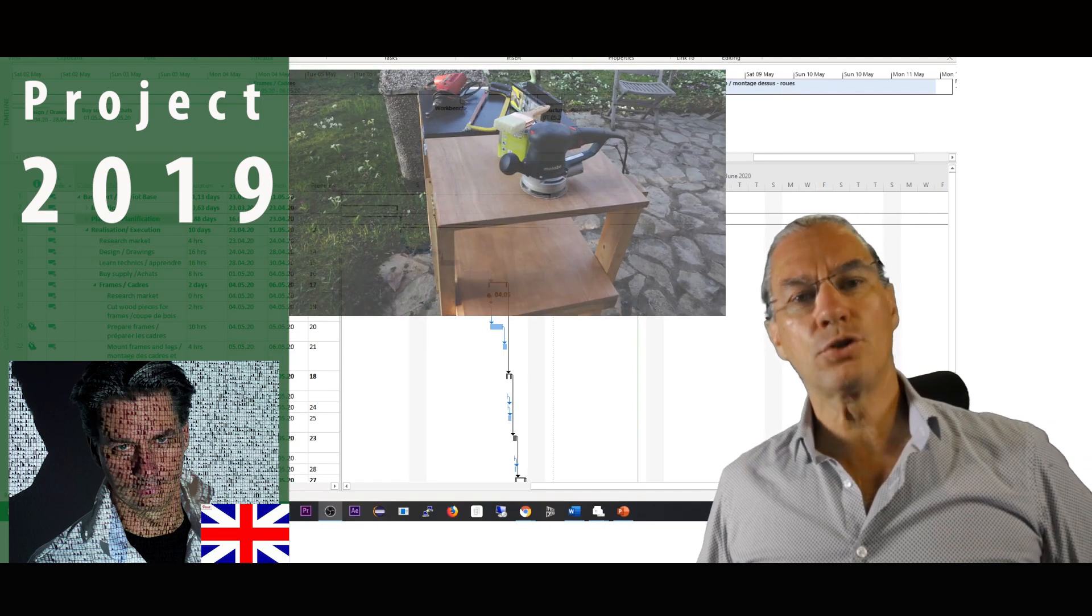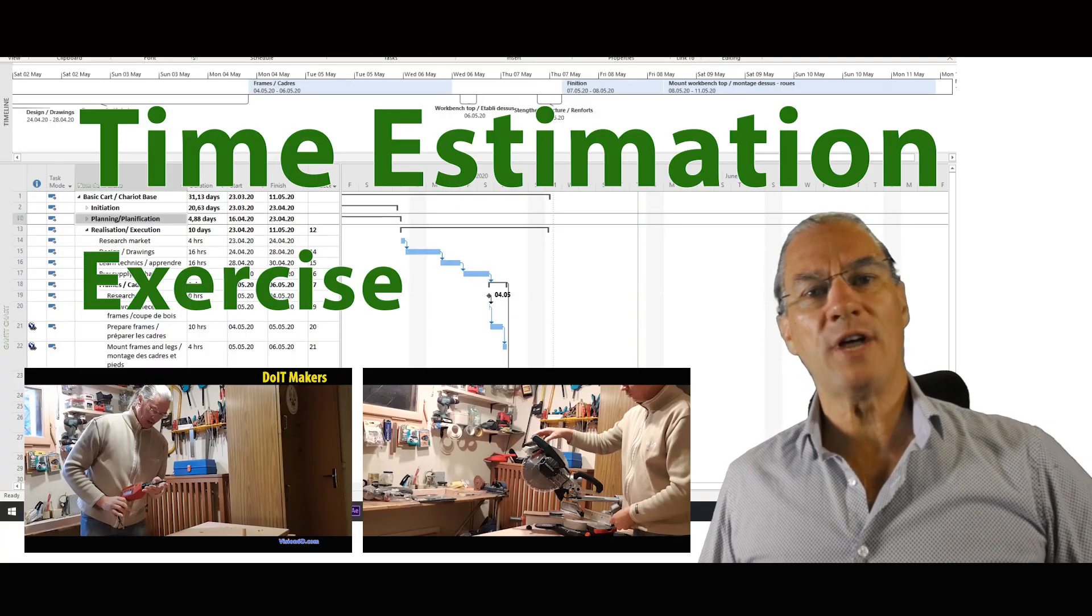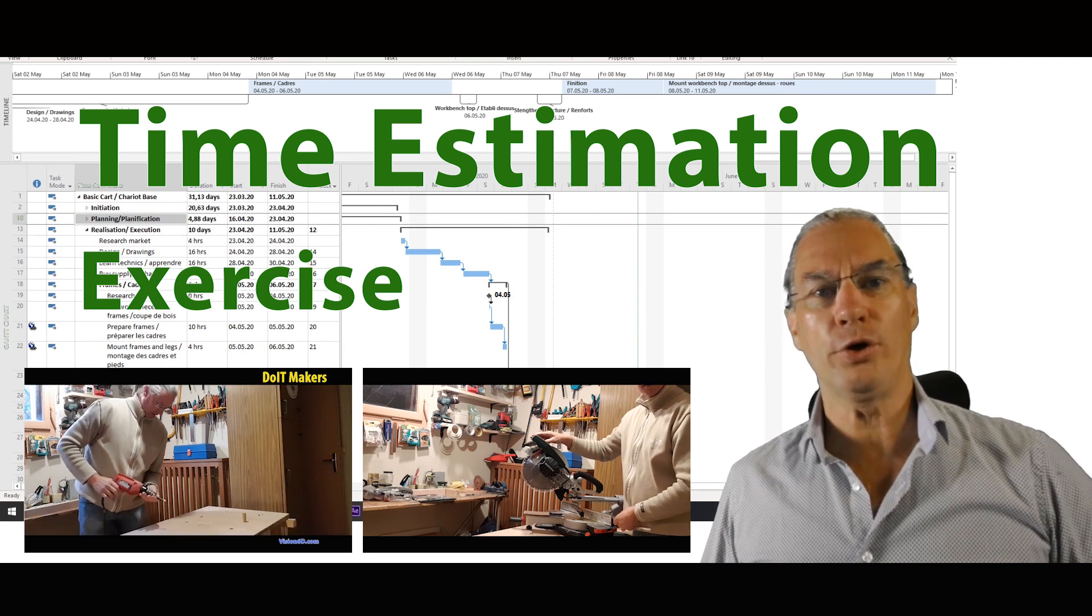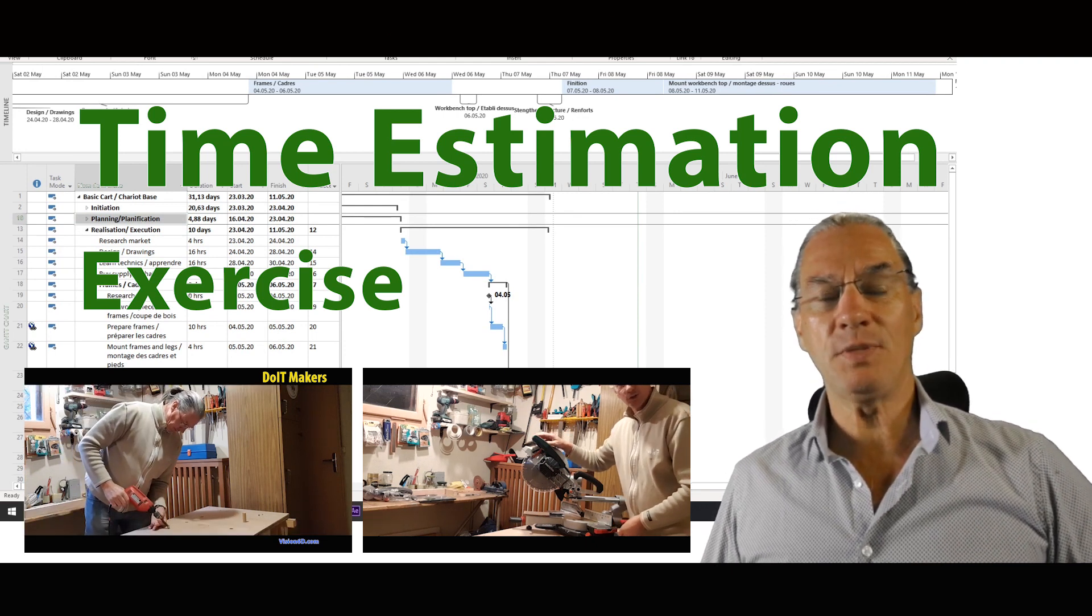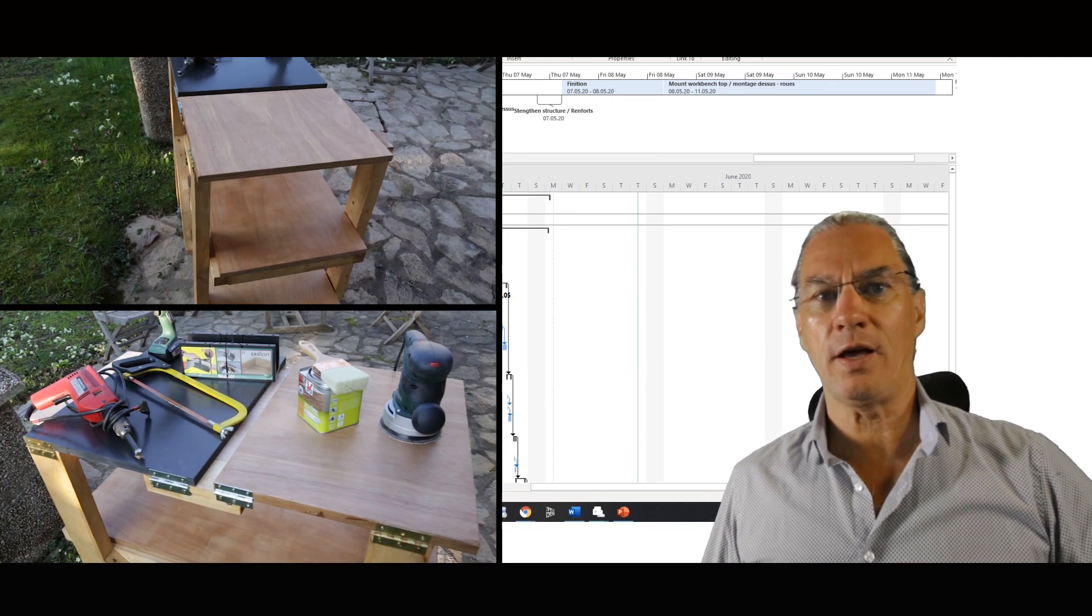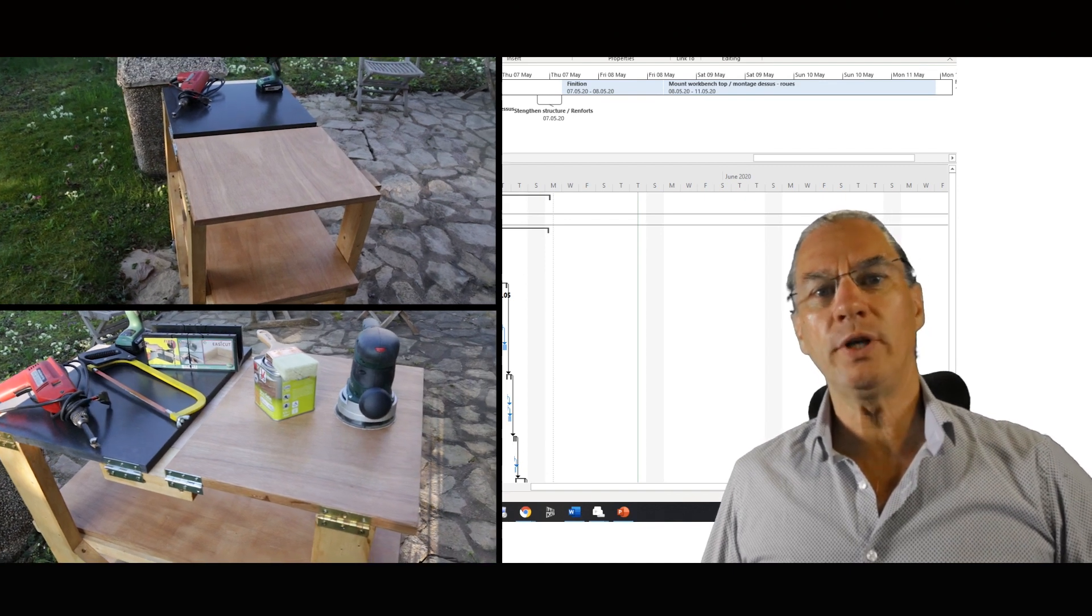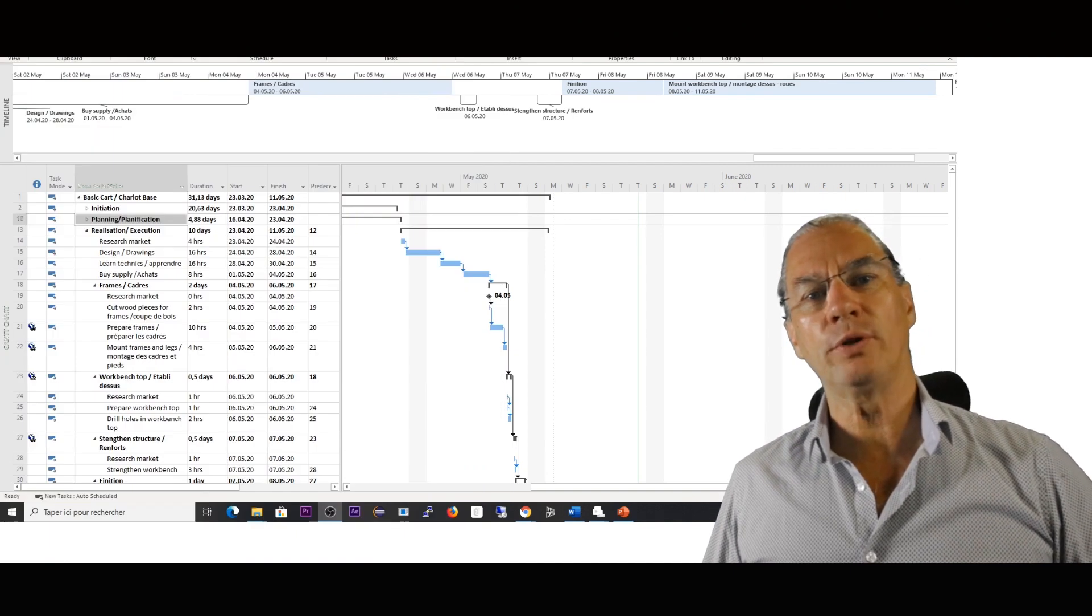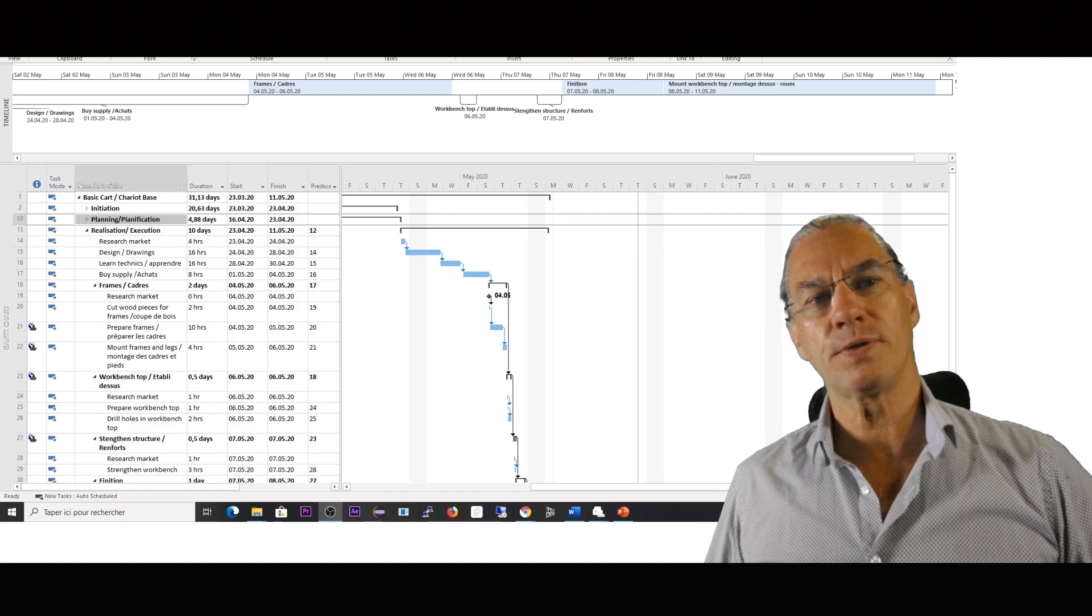I need to build this prototype of a mobile workbench. My estimation is that if I have to do it today, it would be between 40 and 80 hours.